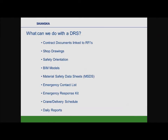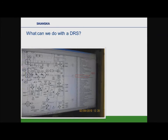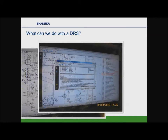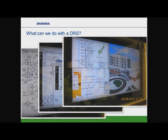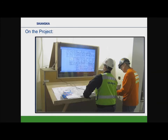Now, a paperless job site — digital resource stations. What is a digital resource station? A lot of people call them kiosks; we call them digital resource stations. It's basically a big monitor with a computer locked in a watertight box. With them, you can have contract documents linked to RFIs, shop drawings, safety orientation videos, BIM models, MSDS sheets, emergency contact lists, and we have a first aid kit in every one of our digital resource stations. On one of our first stations, a carpenter built a plywood box and we put the monitor, computer, and printer inside.